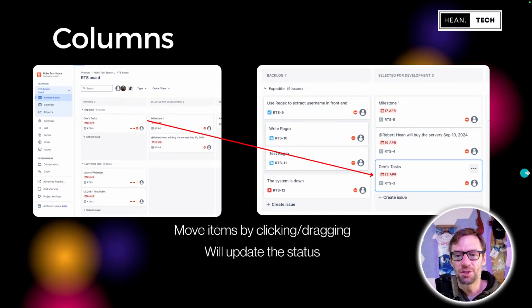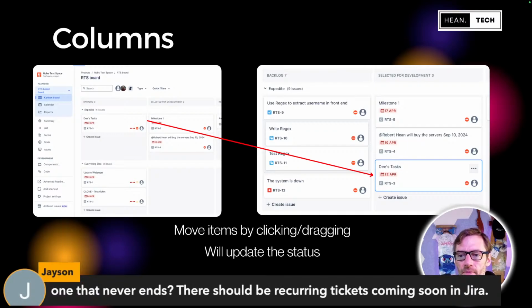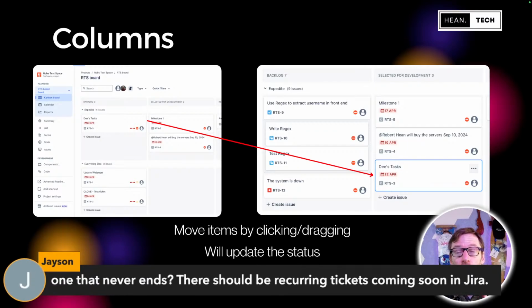All right, I'm seeing a lot of answers for Kim's question here. So one way to do it in Jira is there is a way to make recurring tickets. So you can represent it in every sprint as a ticket. And then the next sprint, there'll just be one. I think with automations, you can do this as well. Every week, make a brand new ticket.